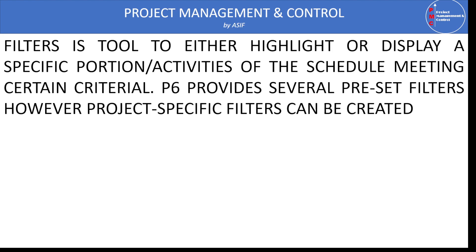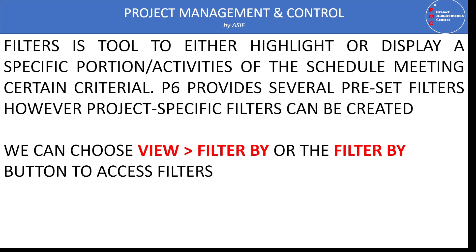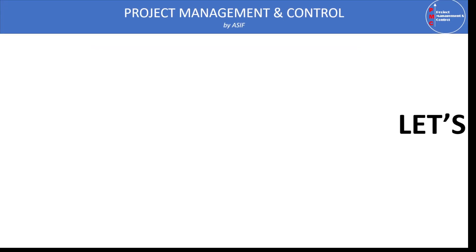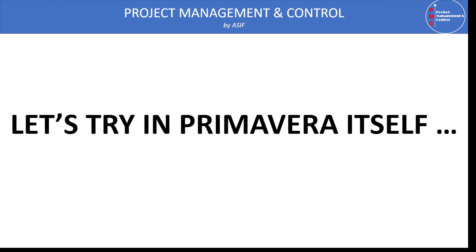So let us see how we can access filters in Primavera P6. To access the filters, we have to open the program and go to the View menu. In the View menu there is one option which is 'Filter By', or alternatively we can click on the filter icon on the main menu bar. When we click on the filter icon, the filter dialog box will open and we can use a predefined filter or create our own.